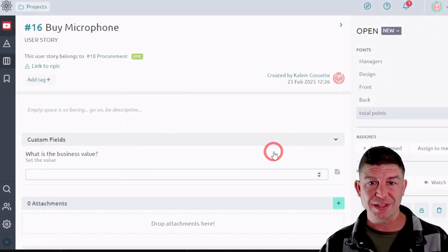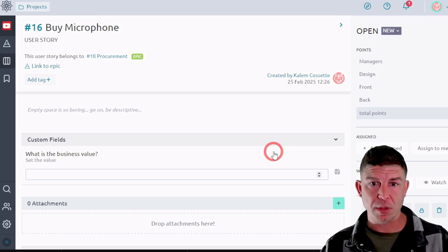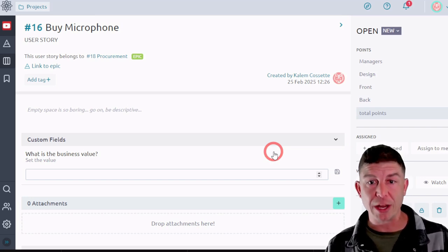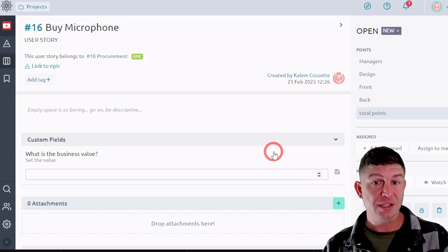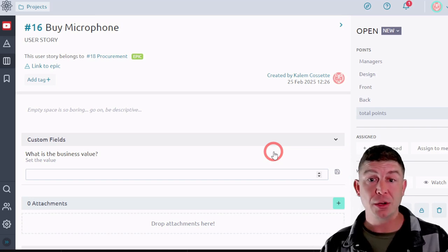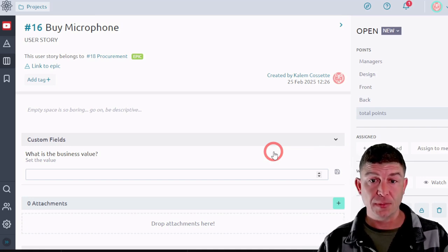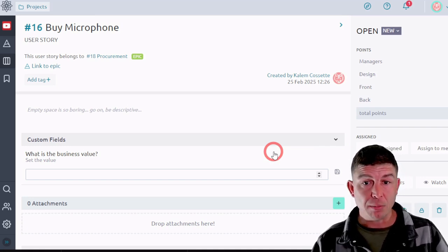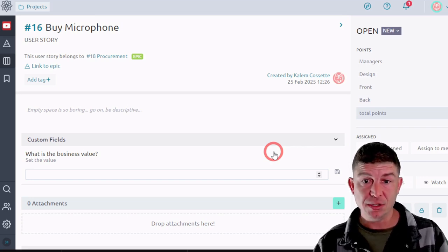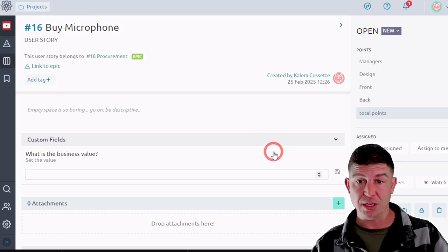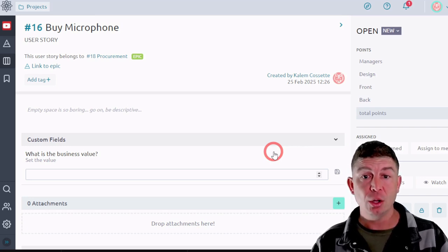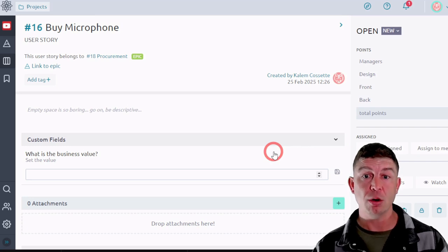So if I'm talking to a CEO or the commander of a military unit, he's going to want to establish overarching goals and a direction that all of the projects contribute to. So I'll usually have one project called Executive Lines of Effort or Commander's Intent or something to that effect. Then, as projects are created by project managers, by subordinate teams, they can then tag what tasks directly contribute to those lines of effort. That way the commander, when he goes in, or when the CEO goes in, he can look at what progress is being made towards his overall intent.